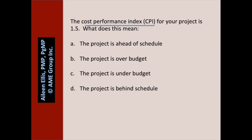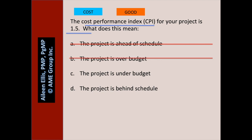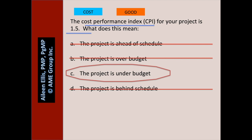The cost performance index on your project is 1.5. What does this mean? Pause the video and answer the question. Is the question about cost or schedule? It's about cost. 1.5 — is that good or bad? That's good. A: the project is ahead of schedule — we have no idea because CPI is about cost. B: the project is over budget — this is false. C: the project is under budget — that's the true answer because our index is greater than 1. D: the project is behind schedule — we have no idea; we would need the schedule performance index.